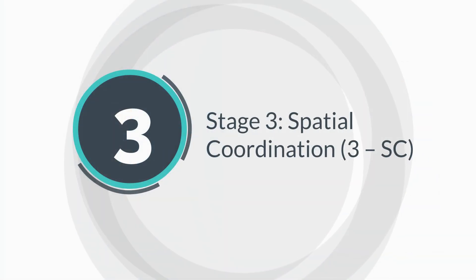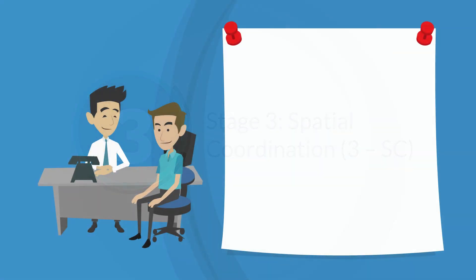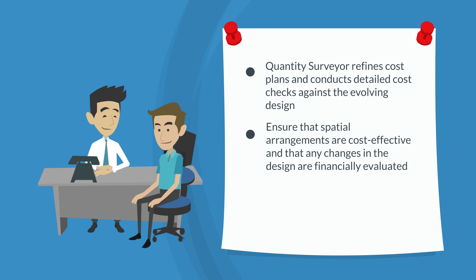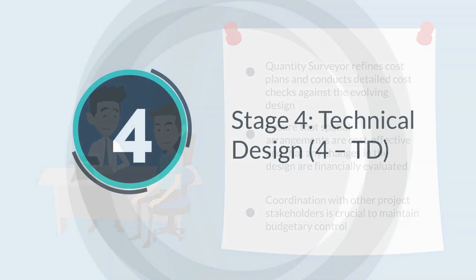Stage 3, Spatial Coordination. At this stage, the Quantity Surveyor refines cost plans and conducts detailed cost checks against the evolving design. They ensure that spatial arrangements are cost effective and that any changes in the design are financially evaluated. Coordination with other project stakeholders is crucial to maintain budgetary control.